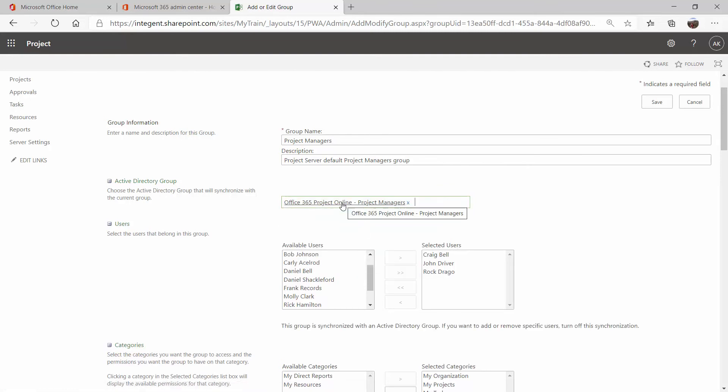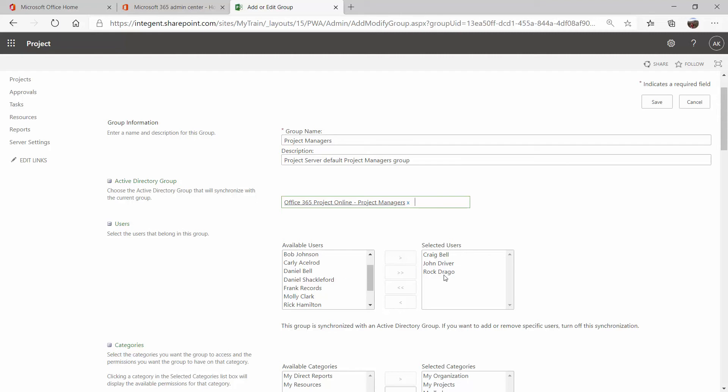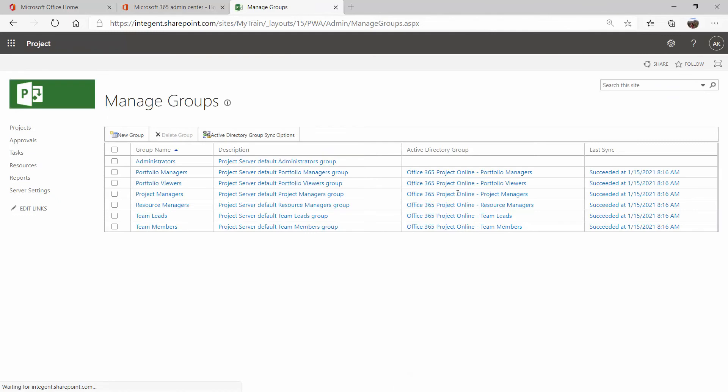And when you do put in your group, you'll see a message pop up down here. And this will stay here as long as you have an Active Directory group. And this message tells you that if this group is synchronized by Active Directory, then you don't have the manual ability anymore to add or remove users from this group. All of that is going to be driven from Active Directory.